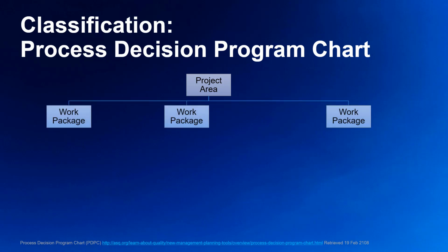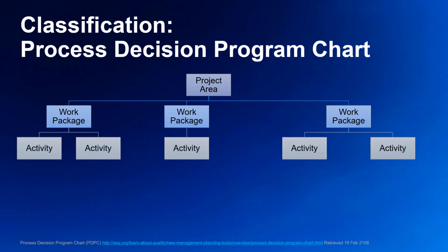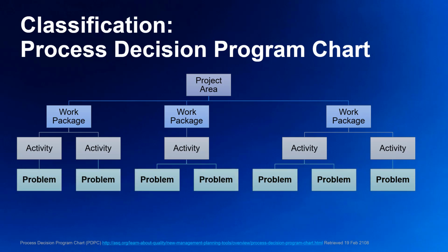The chart includes the lower two levels of the WBS, including select deliverable work packages. The third tier shows tasks identified in the define activities and sequence activities processes. For each task, the team is then brainstorming what could go wrong with the quality of the product deliverables and impede our efficiency in executing the work. The team documents the significant problems at the fourth tier.